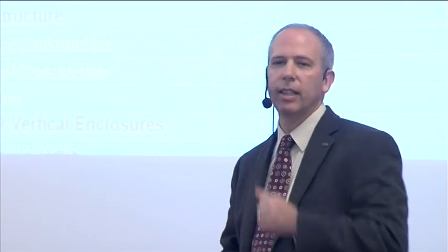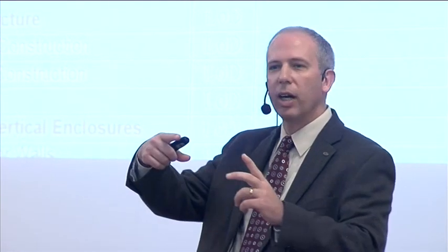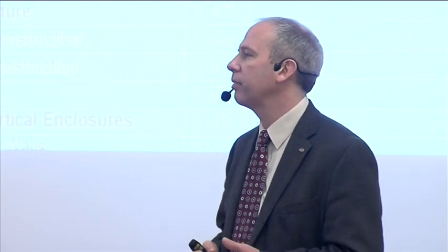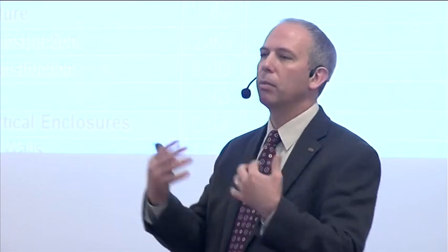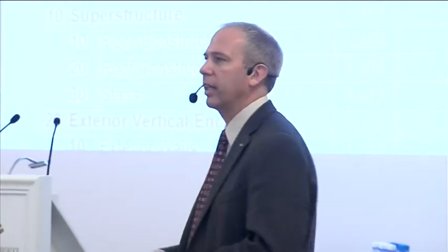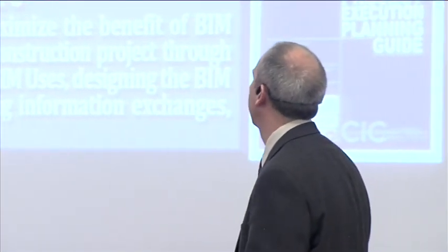For example, at Penn State, we have a very specific attribute list that defines for each pump on the project, we want the following eight attributes of that, and we want it in a very specific format because we want to pull it into our facility management system and be able to use that as soon as the building is turned over to us. And so those are documenting this specific information exchange to the owner.